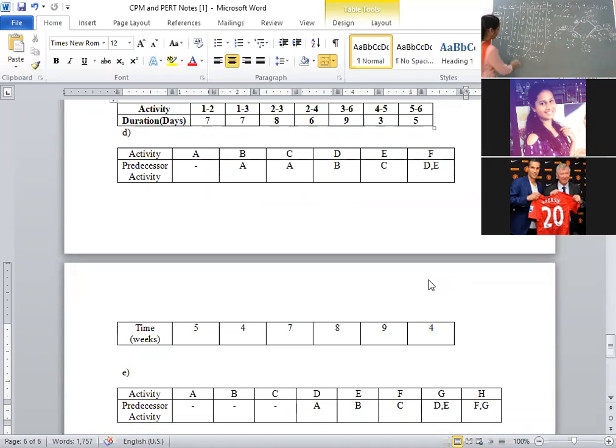Right now, verify by using formula also. This only total float we will verify. Next onwards you calculate because 3 minutes remaining. Okay, total float. Lj minus Ei for 1 to 2, that is L2 minus E1. Through the diagram only directly we will verify. L2 value is how much? 5. 5 minus E1 value 0. 5 minus 0, 5. 5 minus 5 is 0. Are we getting the same answer or not?